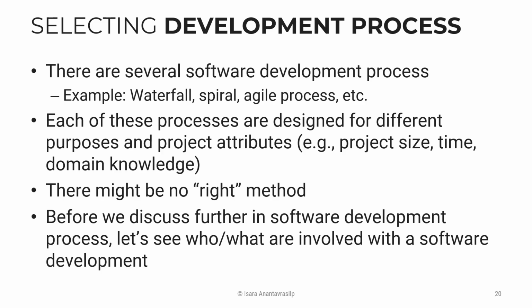release the software immediately. You don't have to repeat the process. You don't have to use the iterative and incremental models because the project is so small. Chances of changes are low, and you don't have much time to show and let the user test anyway. All right, and something like automated testing and continuous integration might not be worth applying on a project that is small, in both size and time, because setting up these tools takes time as well. So you need to consider all this, and the domain knowledge.